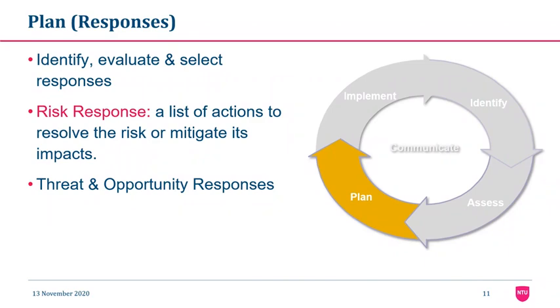You should create risk mitigation strategies, preventive plans, and contingency plan in this step. And you should add the risk treatment measures for the highest ranking or most serious risk to your project risk register.